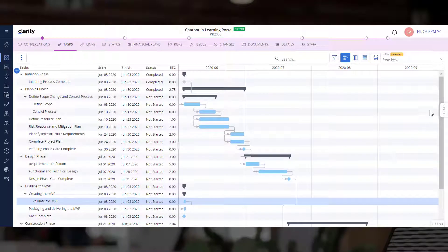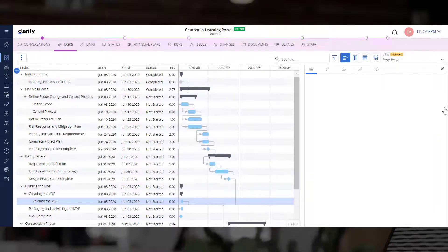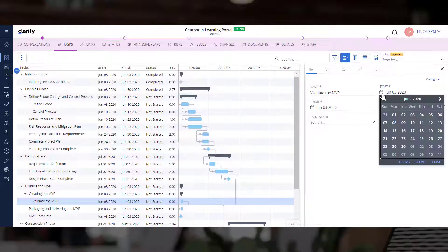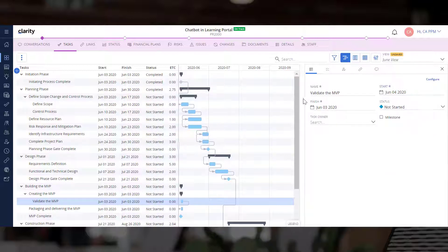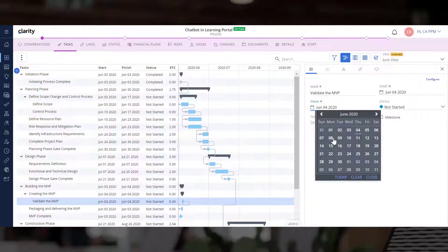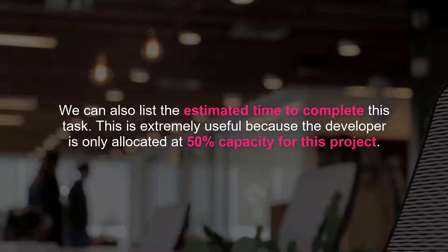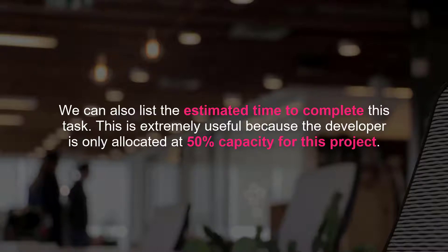Let's edit the tasks and add some details so that resources can effectively complete them. Let's specify the start and end date for the task. We can also list the estimated time to complete this task. This is extremely useful because the developer is only allocated at 50% capacity for this project.